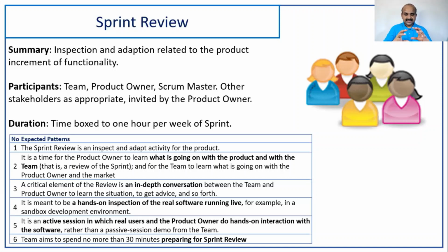So basically, the team comes and says, this is how the feature is working, and the product owner understands that this story has these many acceptance criteria, and out of 4, 3 got met, 1 did not get met, and what is the reason for that? And whether the acceptance criteria have been met in their entirety. So the product owner understands the perspective of the team by looking at the features working in front of him. The team understands the market perspective.